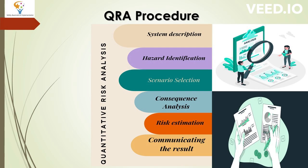The process of QRA typically involves several steps, including: 1. System Description, 2. Hazard Identification, 3. Scenario Selection, 4. Consequence Analysis, 5. Developing Risk Management Strategies and Mitigation Plans to reduce the likelihood and impact of identified risks, 6. Communicating the results of the analysis to stakeholders and decision-makers and incorporating feedback as needed.